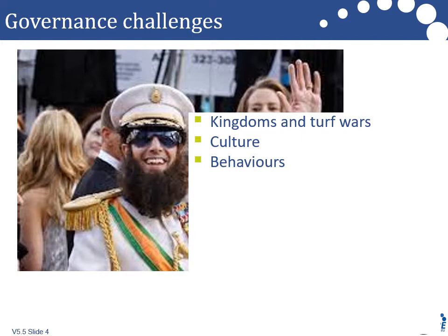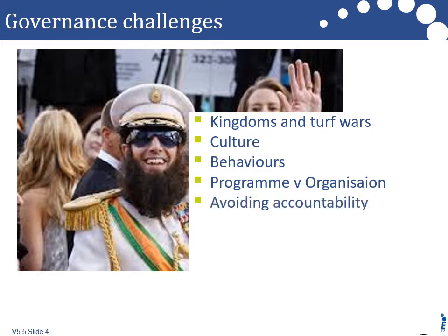If you've got behaviors of avoidance or ducking, or maybe people just making snap judgments, that could be difficult for you too. The difference between program governance and the organizational governance. How is this big new structure going to fit in? Is it working on behalf of one particular division, or are you working across divisions? And that's going to affect the design of your program board. You need to have all those organizational power bases in the program, but they need to accept that the program's making decisions that will affect their power base.